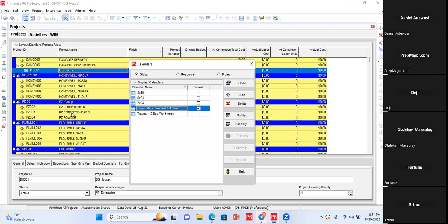Omolola, this is your calendar. You are not sharing the generic calendar, which is in the global. You are sharing a calendar that we can only give you or assign any job outside, assign only jobs that can be done on Tuesday and Wednesday. Any job Monday, Thursday, Friday, we can't assign to you.